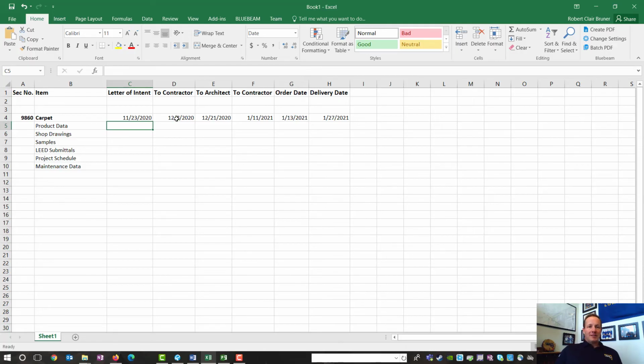But what this tells you right here is that the letter of intent for your carpet subcontractor needed to be in place by 11/23. So if it's not in place, and we're sitting right now at, well, I don't know what the date is when you're watching this, but if it's right before, say it's 1/13, then we're in trouble if we don't have a letter of intent issued. And the superintendent is going to be calling the project manager and saying, what in the world is going on here?